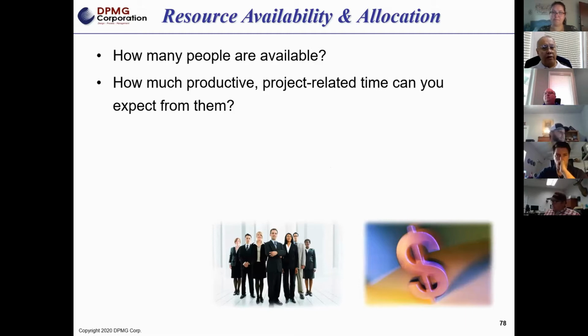because I think when you look at the biggest challenges on any project, it's the availability of the people to work on your project when those individuals are not dedicated to your project. And that's where most of the errors occur, is these assumptions are made, oh, this person has 8 hours to work on my project. If that's a shared resource and that person is working on 2 or 3 other projects, there's no such thing as 8 hours in a day. You might get an hour, you might get 10 minutes. Right? It depends on the subject matter expert, right? It depends on the individual or the skills.